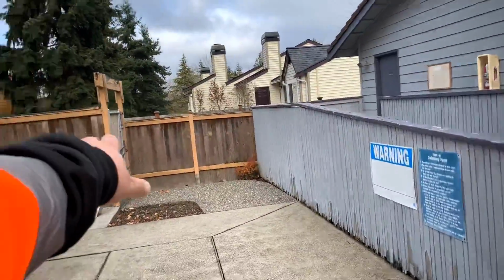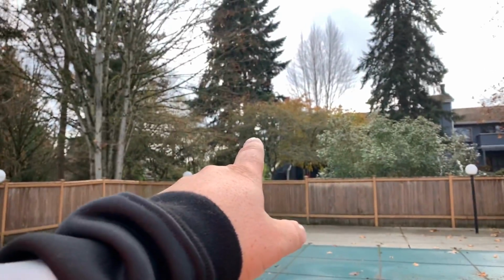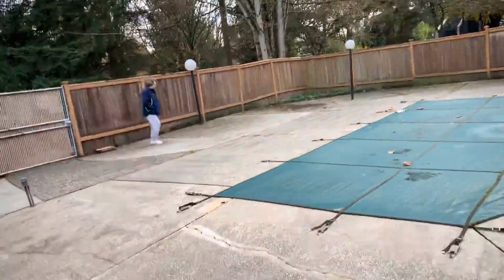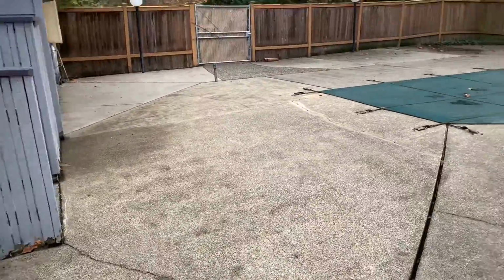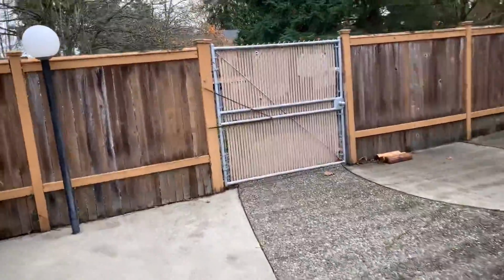There's another entrance on the north end, but we'll have full access to this, and probably would use a line pump to run it all the way in here if we didn't decide to use mechanical wheelbarrows to bring in the concrete. So maybe that's an option too, is mechanical wheelbarrows, and then bring the concrete back here and pour it. One of the two options. I don't know, whatever we think is best to do here. But that's how far it is from the parking lot to this gate right here.